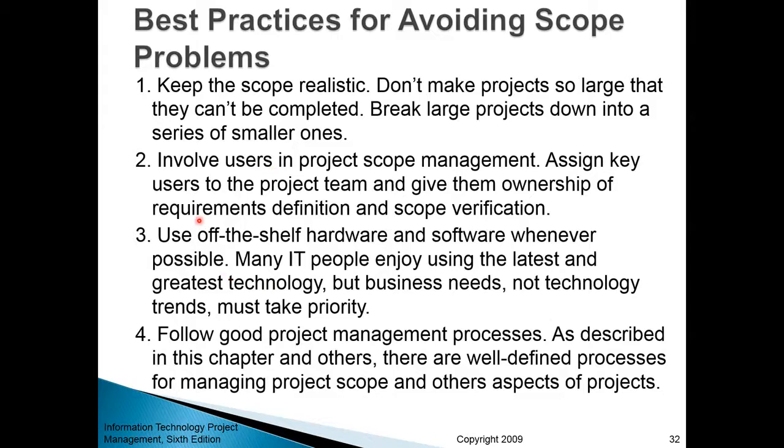Try to use standard technology, standard solutions, standard processes, standard hardware, standard software, because when you're experimenting, when you're being innovative, when you're using cutting edge technology, there's certain benefit to that. You can be the first one to create something, but also it's risky, right? If you're limited with resources such as time and labor and cost, then it's probably not a good idea to experiment because experimentation leads to a lot of waste.